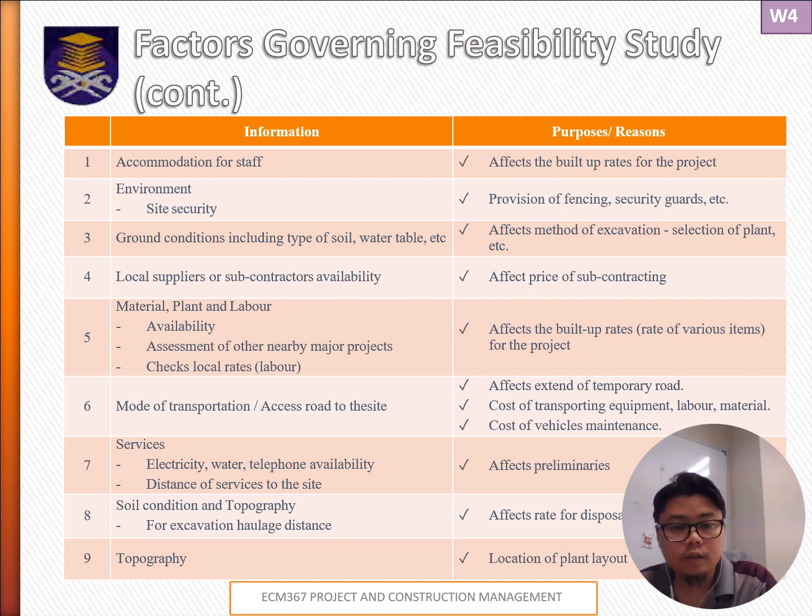And lastly, studying the soil at the proposed site is also needed to ensure it is right for building, and check the land's shape to plan how much excavation work we will need, such as cutting or filling. Okay, all of this helps us plan well and build smart.